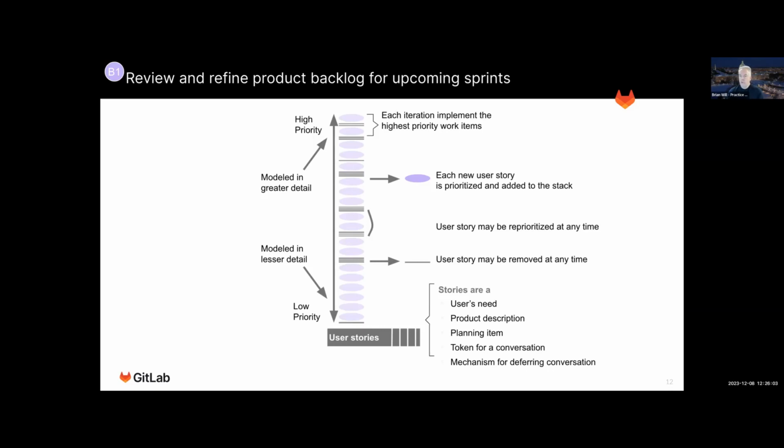A backlog is more a guidance. You pull out the most important and prioritized items for the next sprint. You implement those, then you go back to the backlog, you do more refinement, you pull out again into the next sprint. So it's a very, very flexible way of actually iterating towards a goal.